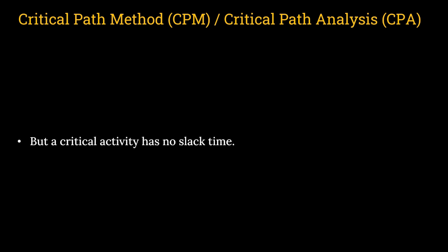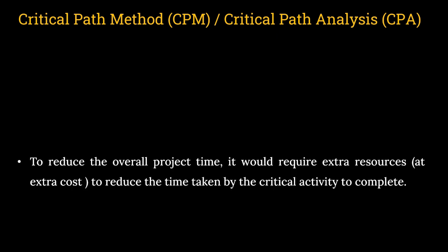But a critical activity has no slack time, as I have discussed right now. To reduce the overall project time, it would require extra resources at extra cost to reduce the time taken by the critical activity to complete.